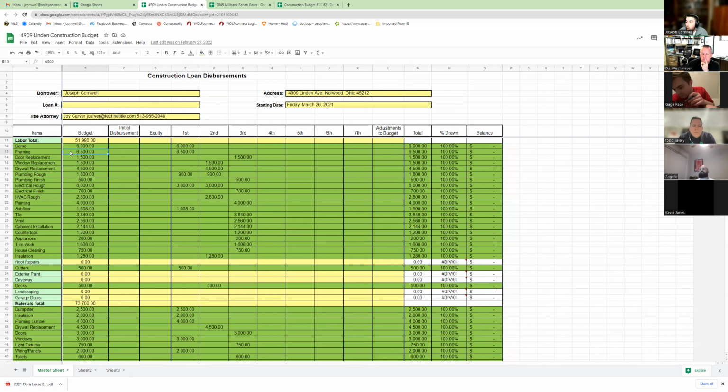Because then if it comes in lower for me or my customer, no one's ever going to complain about saving money, right? But if I think I'm going to send these two guys at 25 bucks an hour, and I end up having to send my other guy at 35 bucks an hour, obviously that's going to throw off my number substantially, especially if you're talking about a multiple week project, right? So that's just another little tip. It may not apply for most of you, but something to think about.